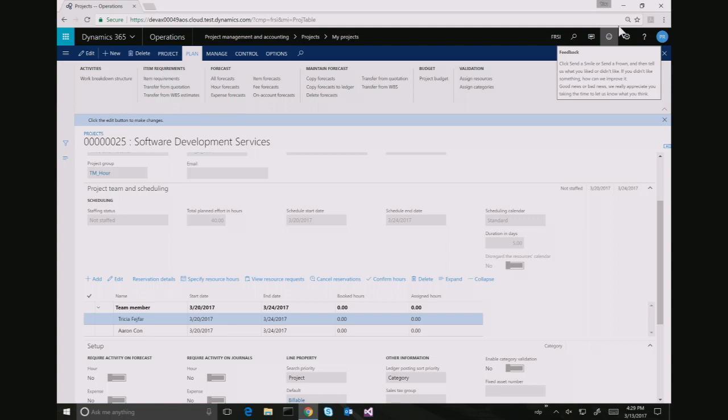When the workflow is still in process and it hasn't been approved, what is the status of Trisha? Is she soft allocated, or can anyone else go and book her as well? So say Prakash has made a request, but the workflow hasn't approved it. What's the status of Trisha? Is she soft booked at that point? She is not booked at all. Anyone else can also request Trisha.